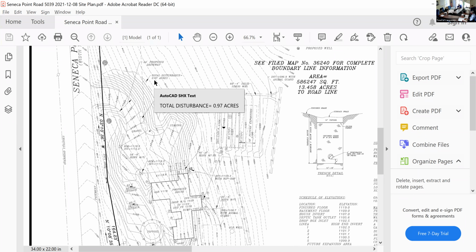Again, your New York State DEC permit kicks in at 1 acre of disturbance, and you put 0.97 acres. The limits of disturbance boundary should be a different line type to distinguish it. If I go out there with my GPS and take a look and you're at 1.002 acres, projects get shut down for months. And you're back to planning board and you're back to DEC and stuff like that.